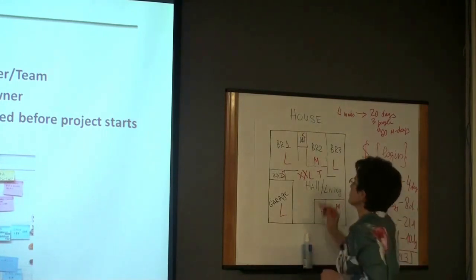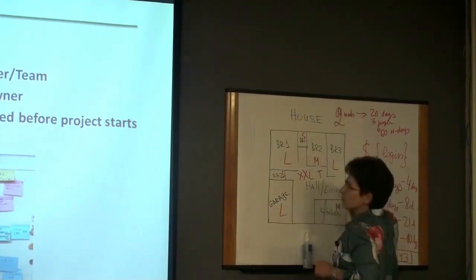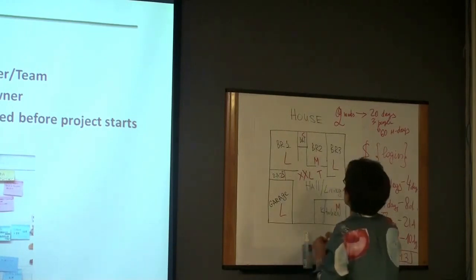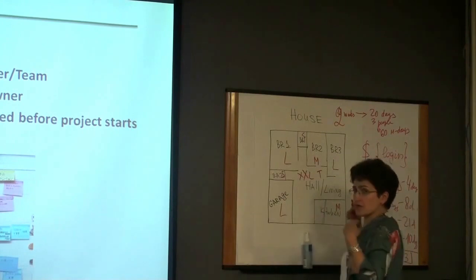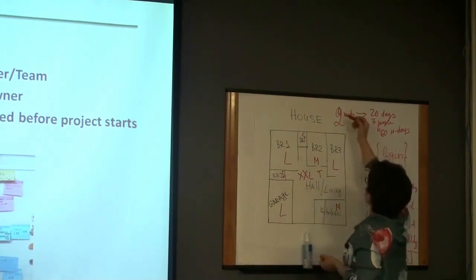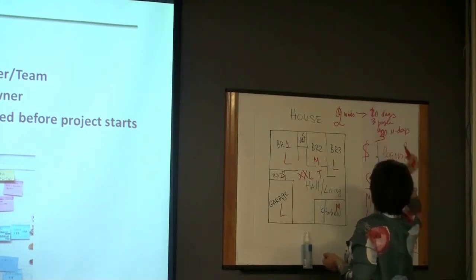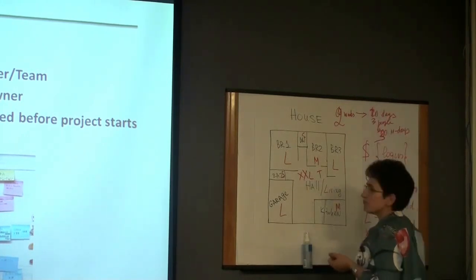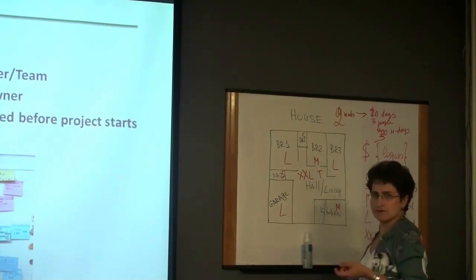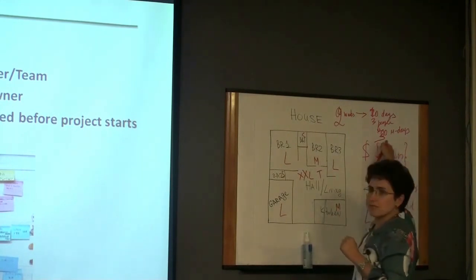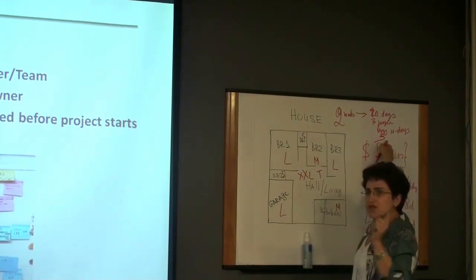Now, to make life interesting, let's say we have an iteration of 2 weeks, because the market is changing very fast, and the marketing people, the product owner wants us to deliver faster. Then if we have only 2 weeks, we have 10 days. With 3 people, we have 30 working days. That means we have 43 days of total effort, development plus QA, but for the first sprint, we only have 30 man days, which means we need to cherry pick features that would fit in the 30 days window, right?